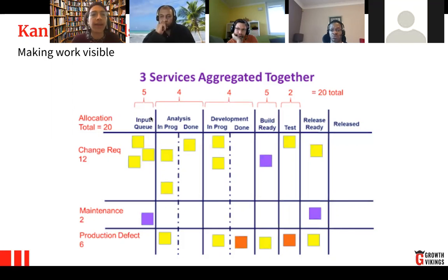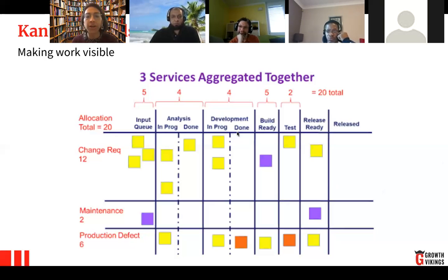And then it turns out that it has different stages. It has a call out stage, then a discovery stage, then a building stage, a delivery stage, and then a closing stage. In each of those stages, you can track the key work that you're doing. So that means that at the top you will have those stages: the call out, recruitment, the discovery, then the building, then the proper delivery or closing, for example.